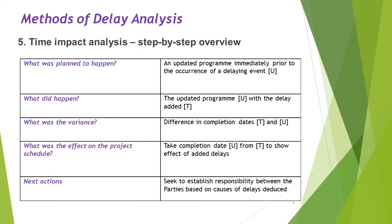Time Impact Analysis. What was planned? The updated program immediately prior to the occurrence of a delaying event. What did happen? The updated program U with the delay added, T. What was the variance? The difference in completion dates T and U. What was the effect on the project schedule? Take the completion date U from T to show the effect of added delays. Next action: seek to establish responsibility between the parties based upon the causes of the delays deduced in all activities.